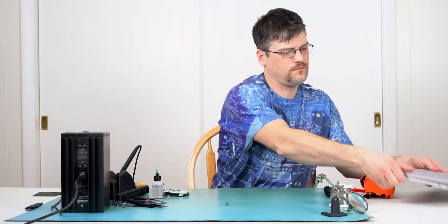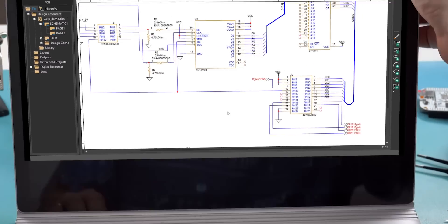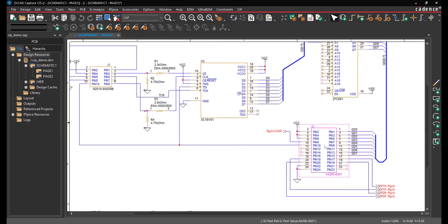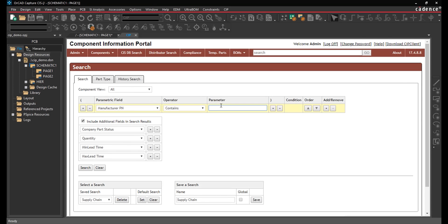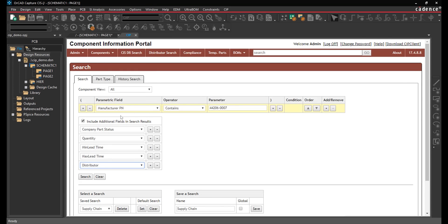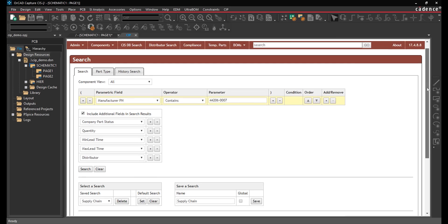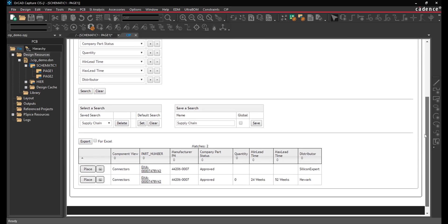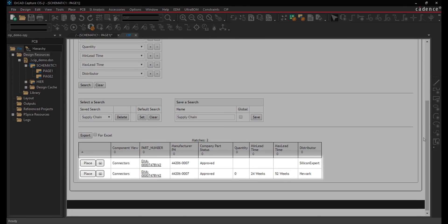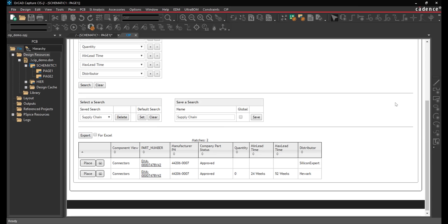Easily search your existing part library using additional search parameters to review quantity, minimum and maximum lead time, and more during part selection. This component has no quantity on hand, a minimum lead time of 24 weeks, and a maximum lead time of 52 weeks, which will not meet the project deadline.